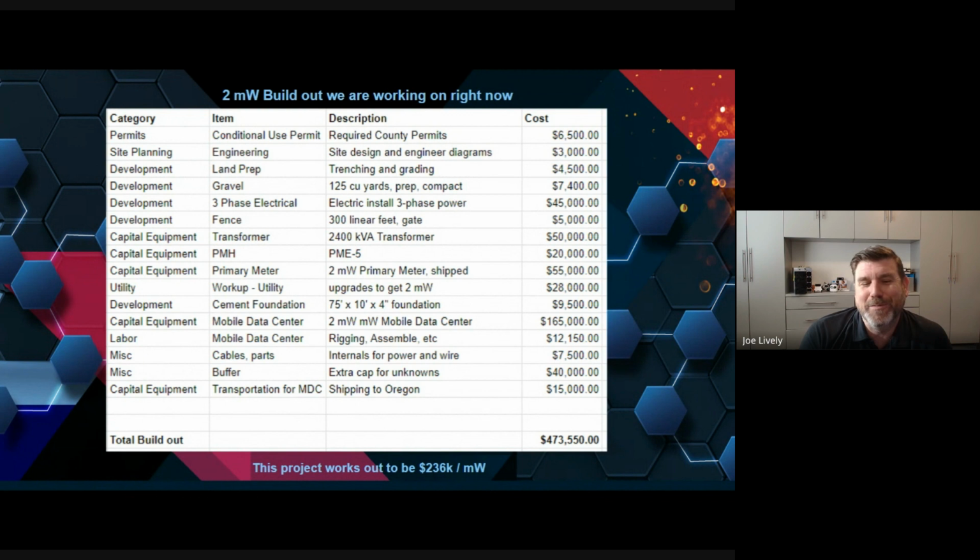I hate this primary metering cabinet with every fiber of my being. So hard to find them. I tried 5 or 6 different used ones. The utility company would not take a used one. They billed me out. They wanted to charge me $25,000 for the metering cabinet, which, no biggie.